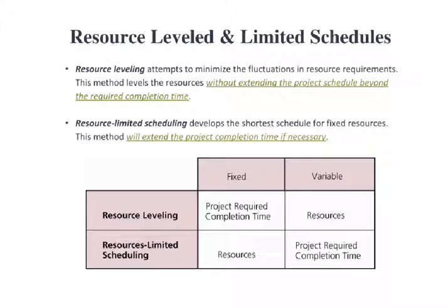You then level resource utilization the best you can within that available duration, that available time for the project. You can take steps to try to minimize fluctuation, but often you won't be able to completely level resource utilization when the timing of the project is constrained.